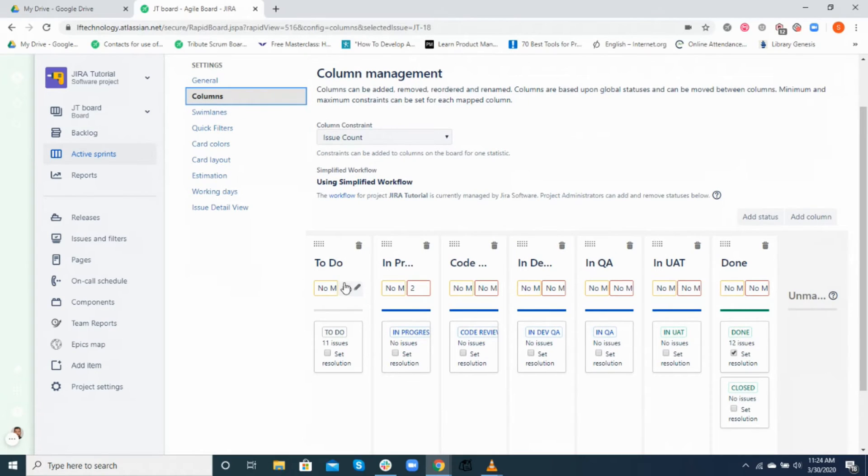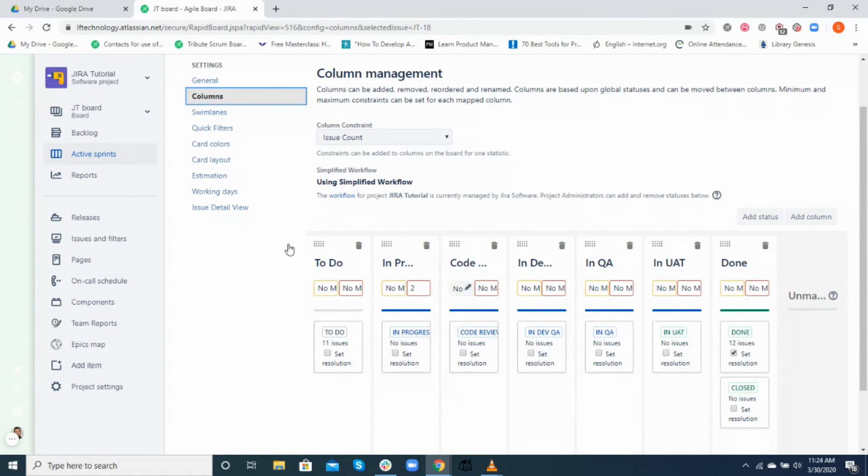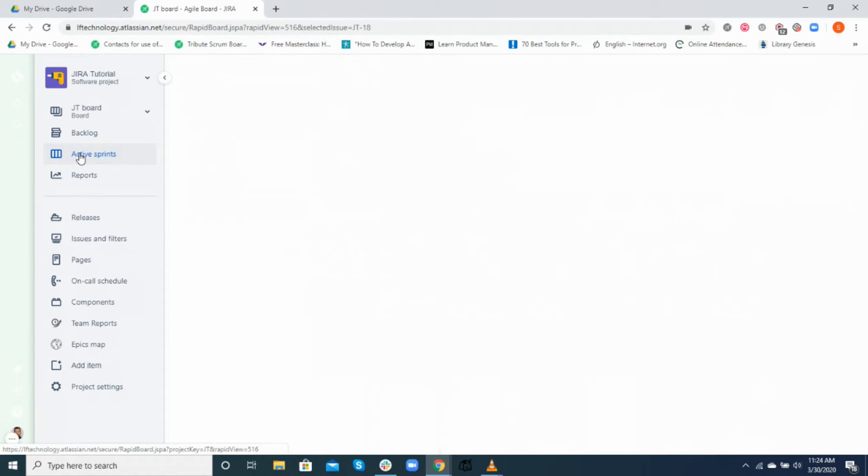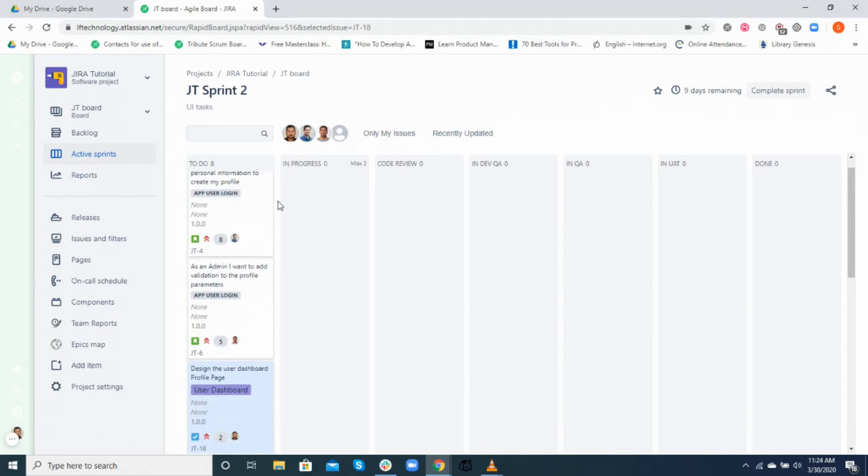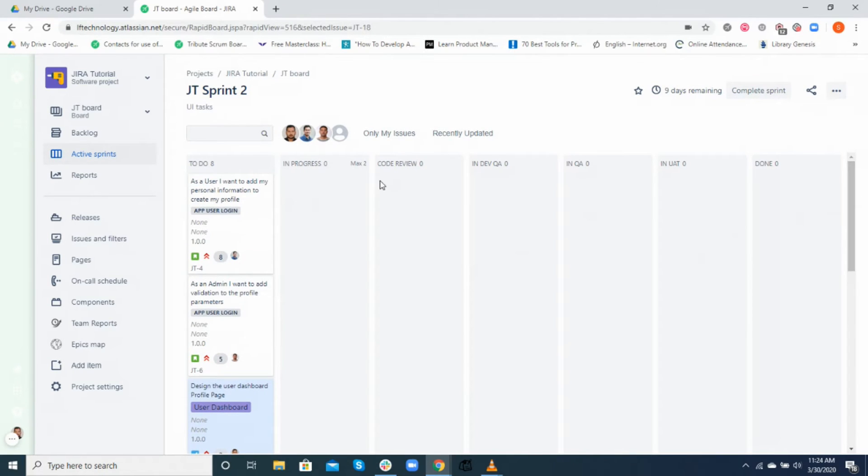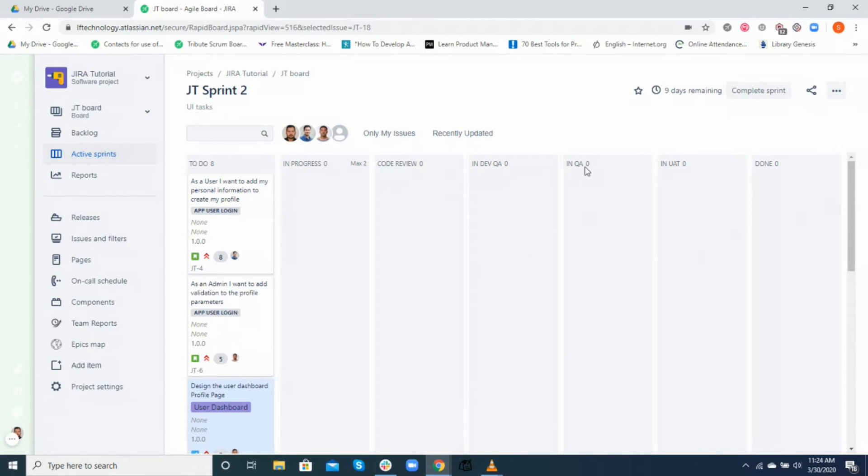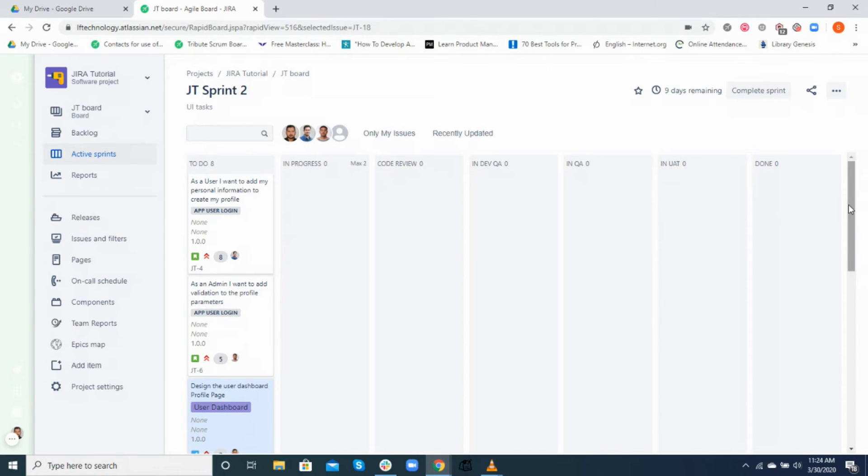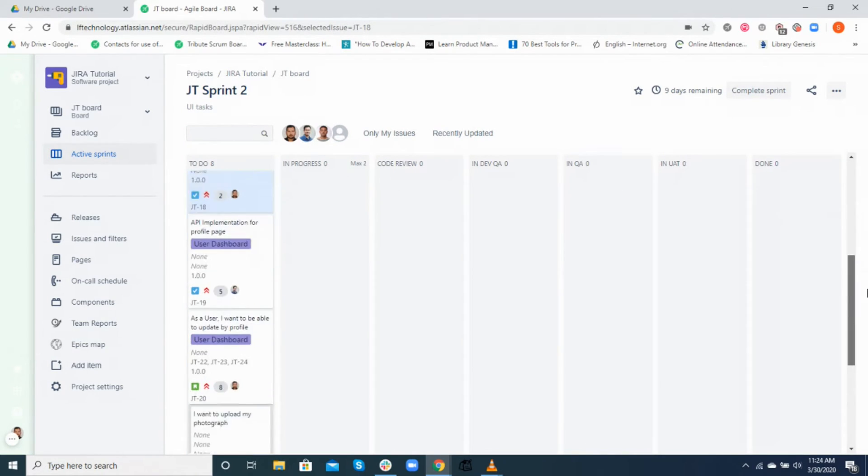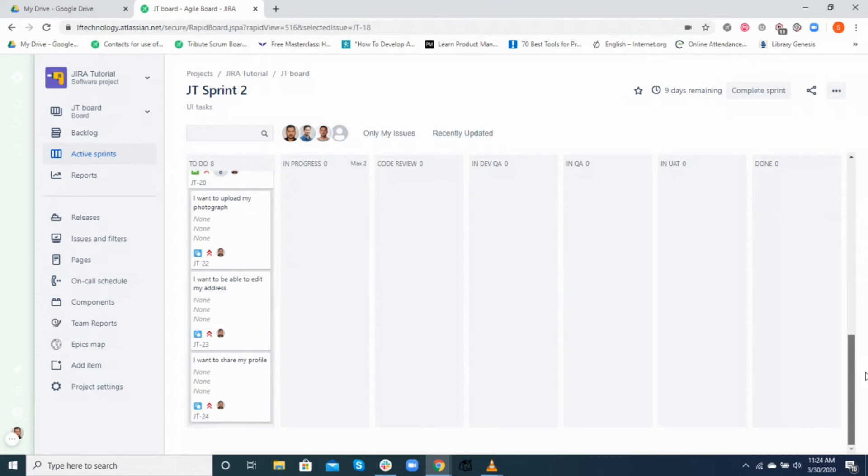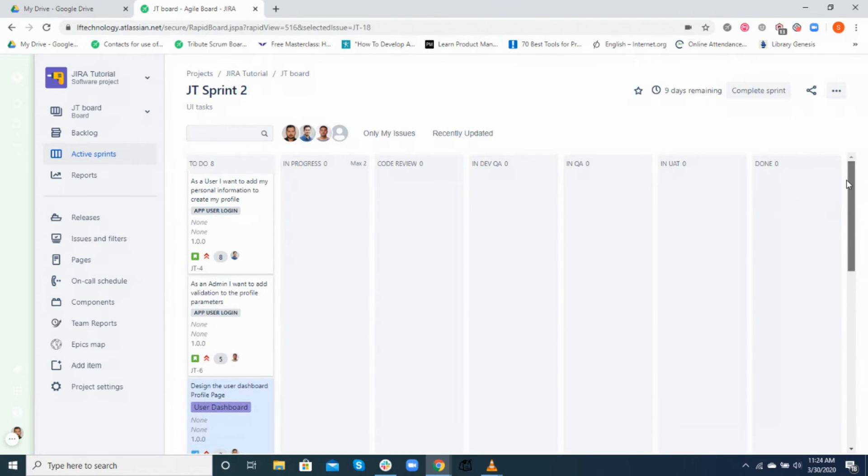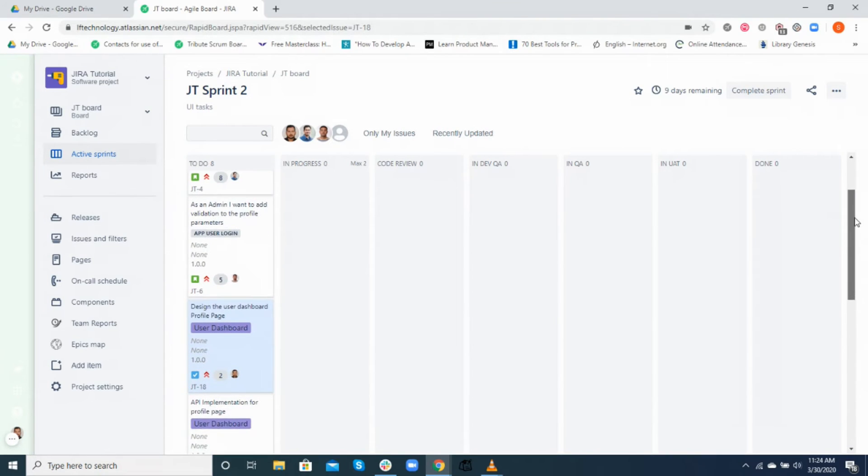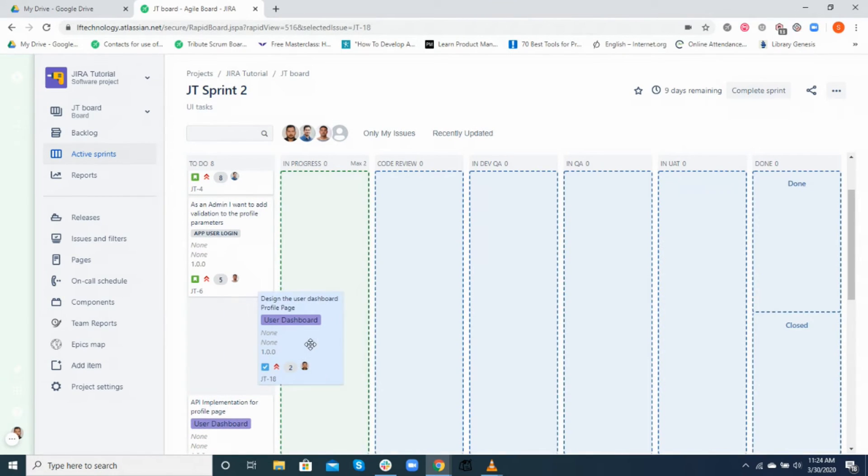Starting with columns, column helps to visualize where the tasks are at in different stages in the workflow. The customized workflow at LeapFrog includes to do, in progress, in code review, in dev QA, in QA, in UAT, and done. All tickets first appear in the to do column once a sprint is started. After a developer decides to work on a task, she will pull the card to the in progress column. This would give the entire scrum team a sense of which tasks or features are currently in progress.